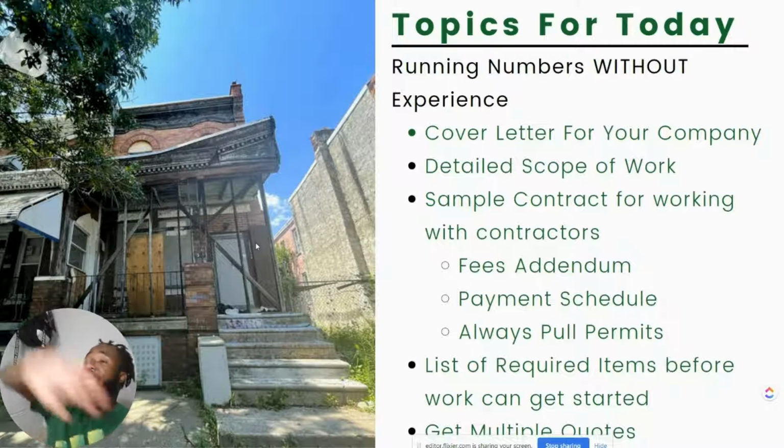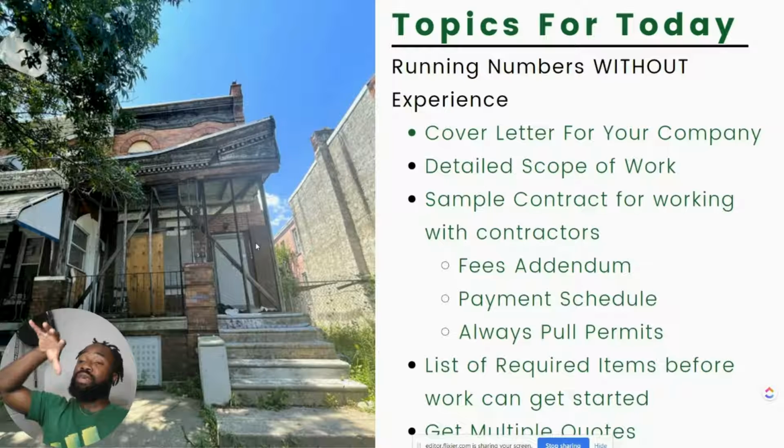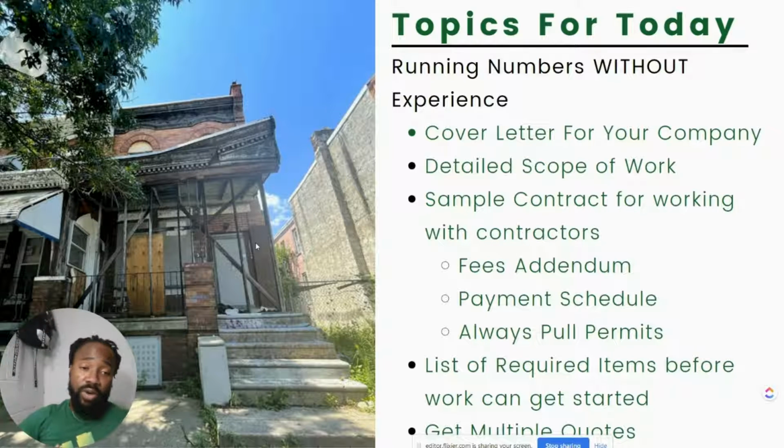And now there's wood everywhere. There is dust everywhere. There are nails everywhere, and then food and cans and plastic bottles that were not there when they first started. But now that they've worked and the job is done, there's all this stuff all over the place. Oh my god, it infuriates me. So what I did, just out of pure annoyance, is boom, $500 cleaning fee. It comes right out of their invoice. And I tell them all the time, listen, if you want this money, you need to go and clean that place. So now when a framer is done, that place needs to look immaculate.